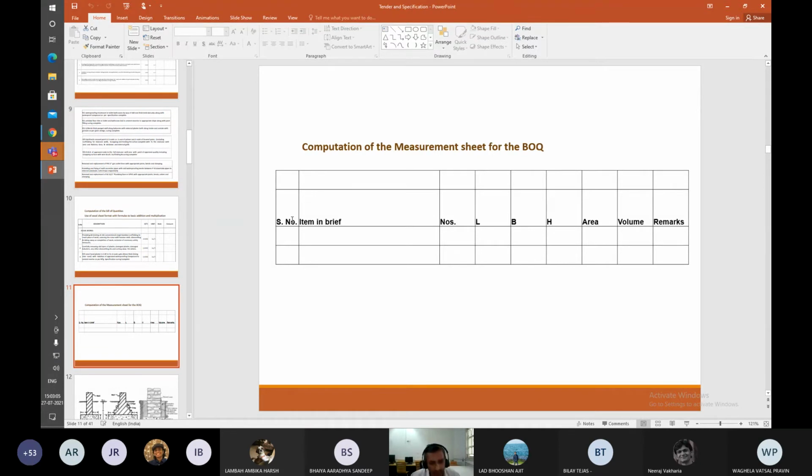So it's literally like shuttering. There are planks and members that are put in to make sure that as and when you are doing the work, the mud does not fall in and spoil your work. So you may lay PCC, very expensive cement concrete work, and then your mud would fall on it and just take it away.